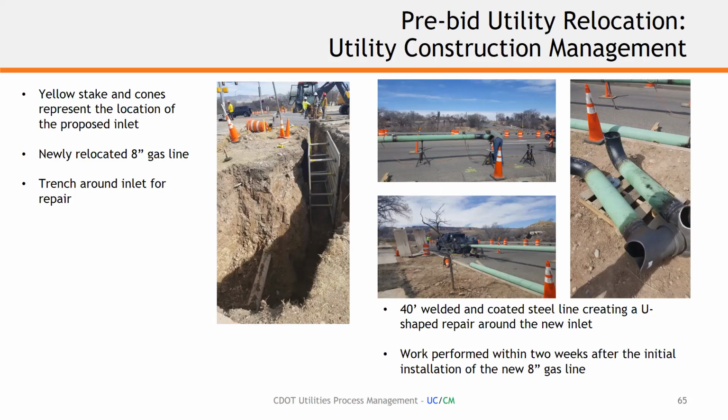But if we'd had personnel in the field as they were doing the full installation, we could have caught this before it actually occurred. So a real learning process for us. It's unfortunate it happened. Glad we were able to catch it before our contractor was fully on site. But certainly a mistake that we had to remedy pretty quickly, and it cost the gas company quite a bit of money, obviously.